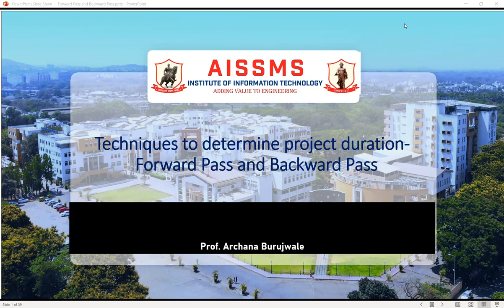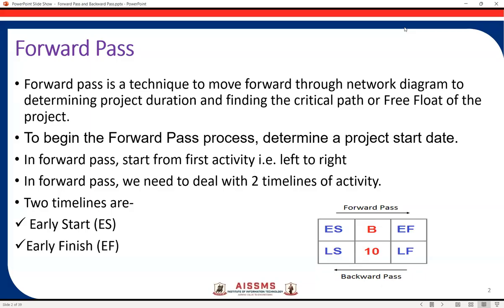So first of all, we'll start with the forward pass. The forward pass is basically a technique to move forward through the network diagram to determine the project duration and finding the critical path or free floats on the project. We are moving forward in the network diagram to find out the critical path or the free floats of the project and to find out the different timelines.